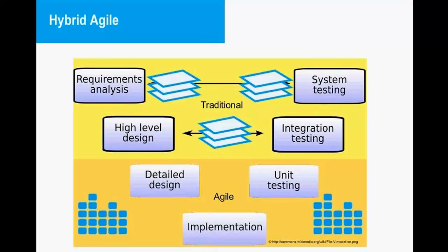If we talk about the V model, it is a representation of the system development lifecycle. On the left side of the V, we see a decomposition of our requirements, so they get more granular the deeper you go. And on the right side of the V, we see the integration of the parts, so we see the validation, all the systems, the testing of the system. For example, on top left, we get a requirement analysis. At the end, we need to do the testing of this system also.